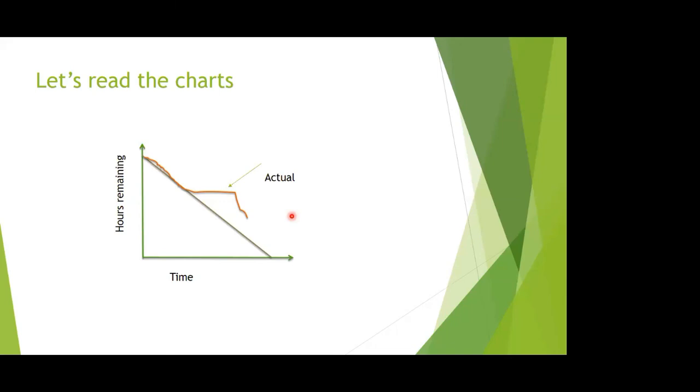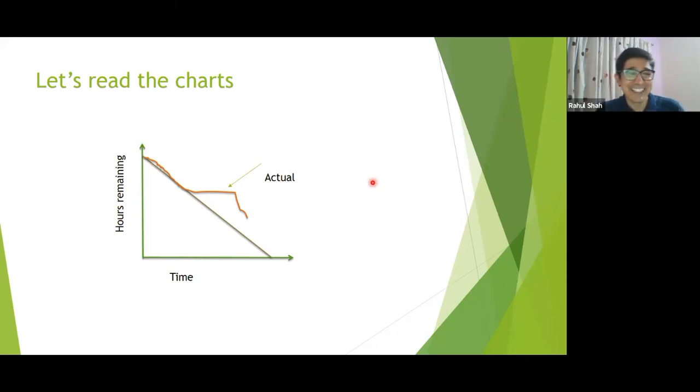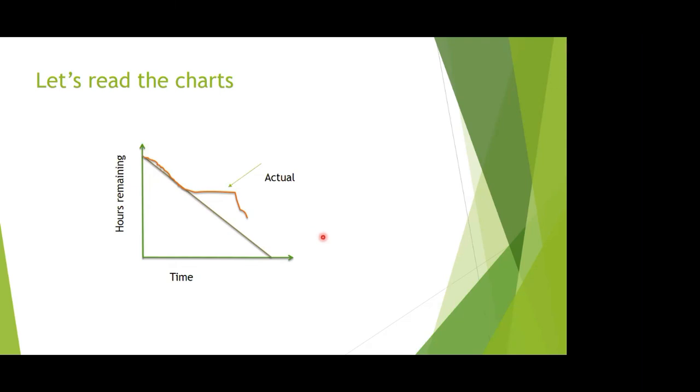I guess one of the reasons could be that the team has not updated the board for a couple of days. That is possible, yeah. So we really have to figure it out. They were doing it very regularly and suddenly, but yes, those are some risks. Maybe they became issues suddenly.